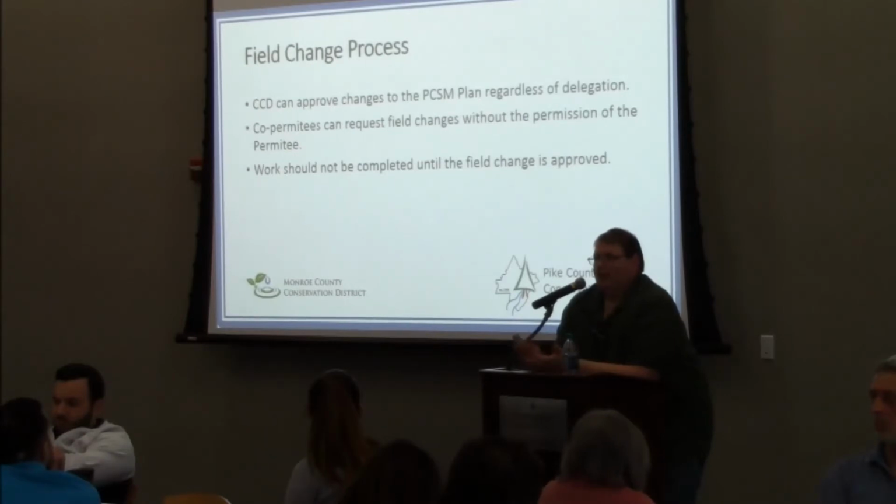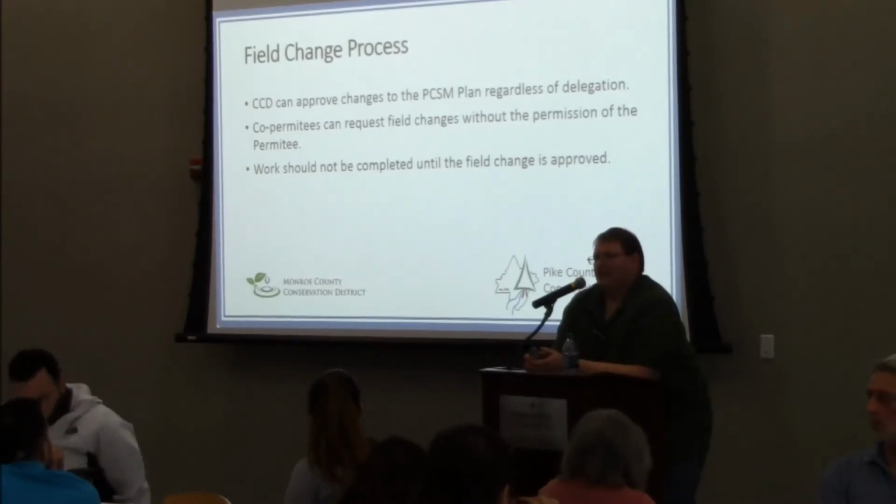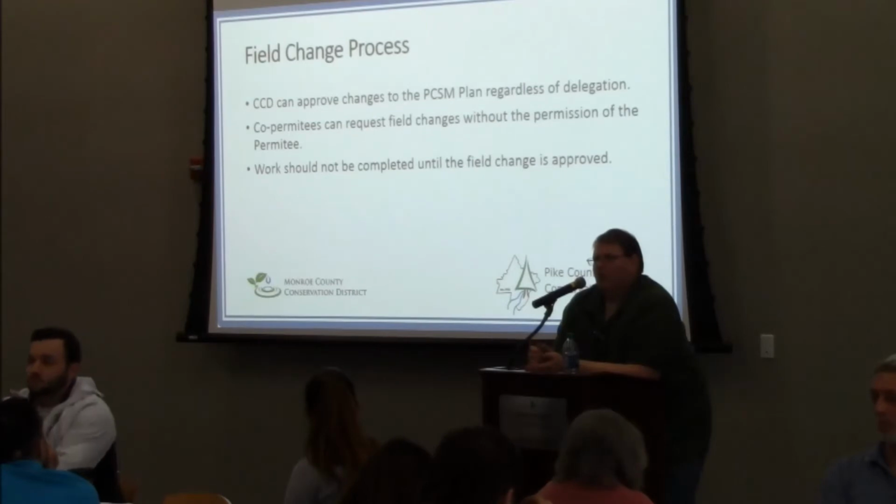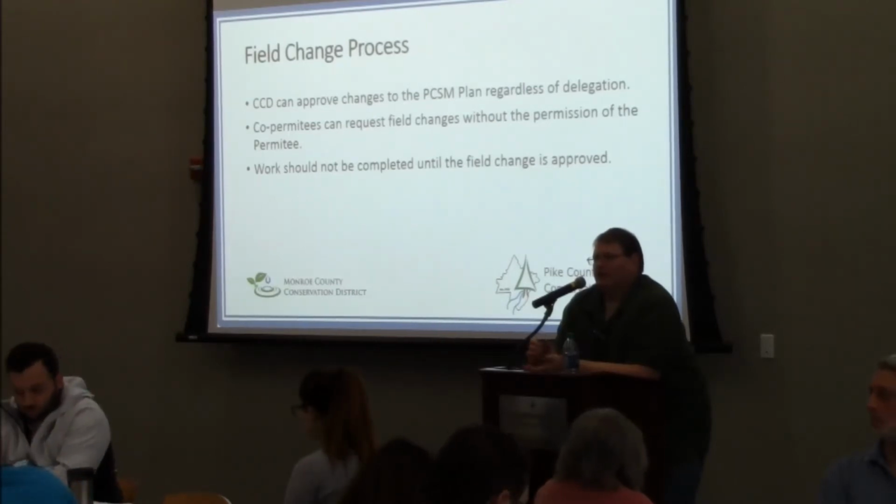Now, we'll authorize that change. If it's implemented without the owner's knowledge, they may not be reimbursed for a change. That's between the permittee and co-permittees. That's not something that we get involved with. And this is a big one. Work should not be completed until the field change is approved.